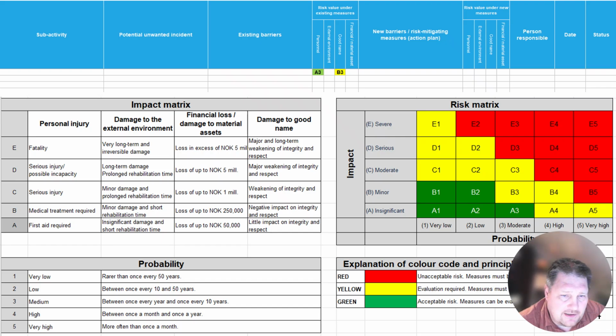And then you can combine both the technical and operational risks in this risk register, and you can also include all the different impacts in the same register. By adding mitigations in the same spreadsheet, then you can also demonstrate for each individual risk how the total risk will be reduced.